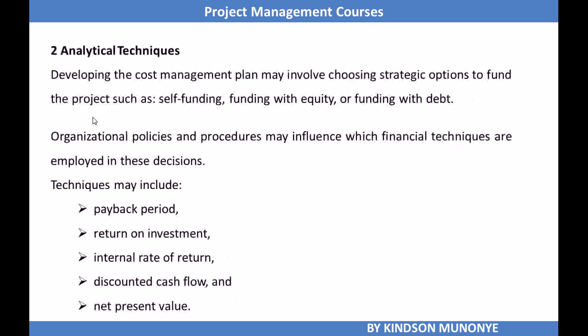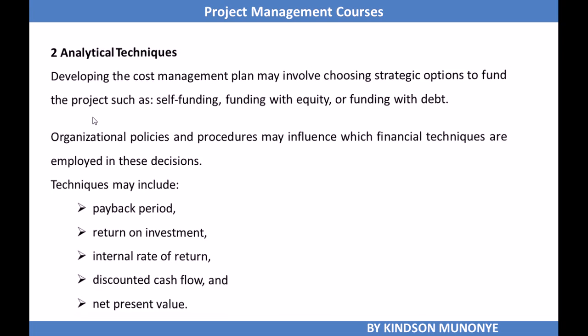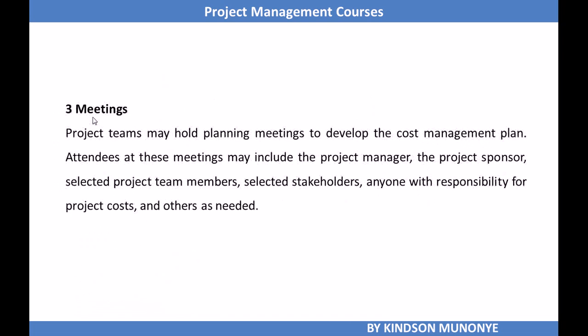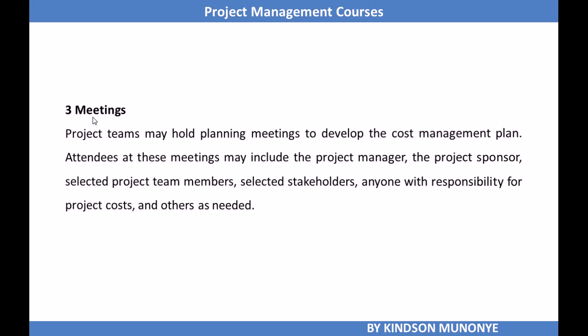Of course, we need analytical techniques for us to plan cost management. We need to decide what kind of options we need to fund the project. Will it be self-funding, funding with equity, with debt, etc.? Analytical techniques might include payback period, return on investment, internal rate of return, discounted cash flow, and net present value. Of course, we need meetings as well. Project teams may hold planning meetings to be able to develop an effective cost management plan.